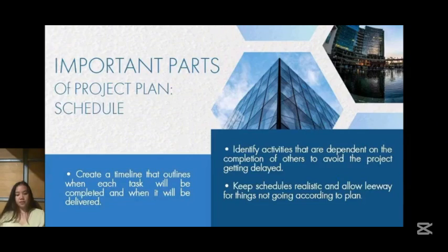So for example, if you're starting a new clothing line, you need to finish the designs before you can start making the clothes. Then, you need the clothes ready before you can start advertising. If the designs take longer than planned, it could delay everything. By planning carefully and adding extra time, you can avoid problems.